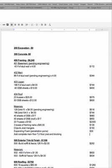Okay, you're going to send that to the engineer, the Denver build, like whoever we're using for lumber. So whether it be Alpine or Denver lumber or whoever it is, they're going to do the takeout for you. You'll send them over a set of the plans. You'll send them over a copy of the engineering, and then you'll ask them to do what's called a takeout for you. So I'm just going to plug in there. The material is going to be about 400, and then the labor, we need to add it here.